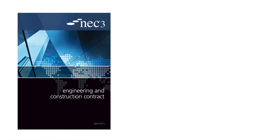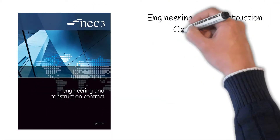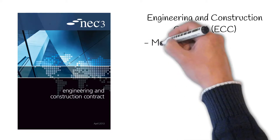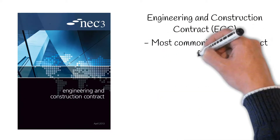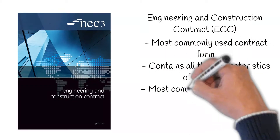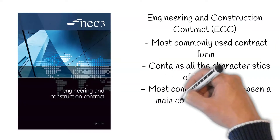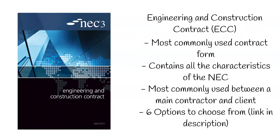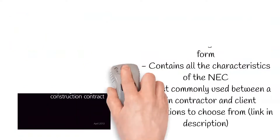The contract forms which fall under the NEC are as follows. Engineering and Construction Contract, or ECC for short. This is the most commonly used contract form and contains all the characteristics of the NEC. This contract is mostly used between a main contractor and a client. Within this contract, there are six options of which the employer would choose what they believe will achieve the best value. If you'd like to know more about these options, there will be a link in the description of this video which goes into them in more detail.